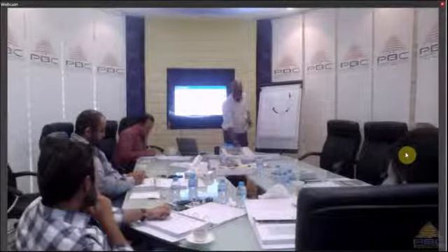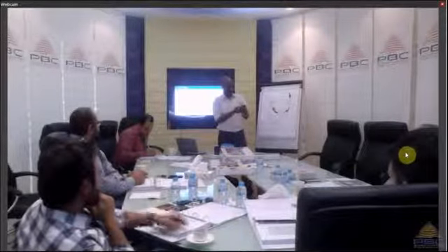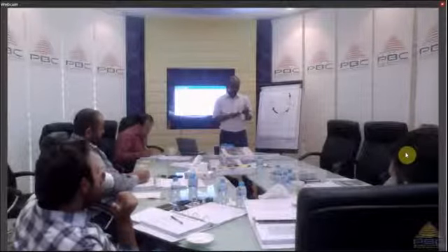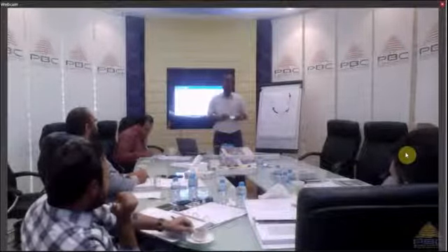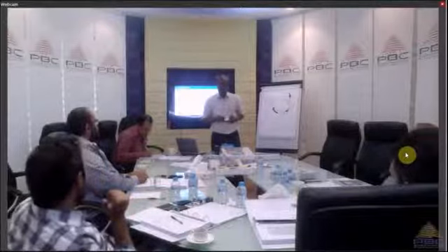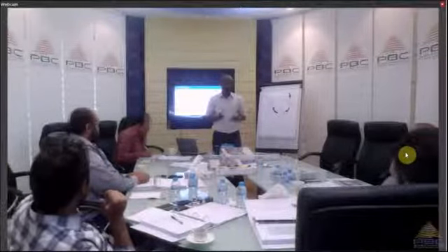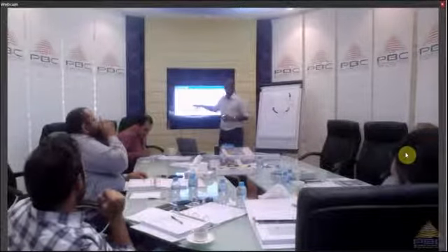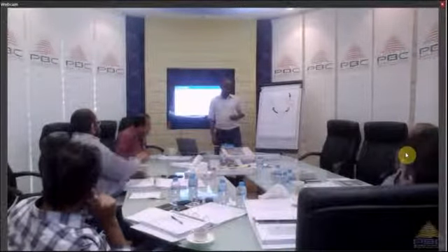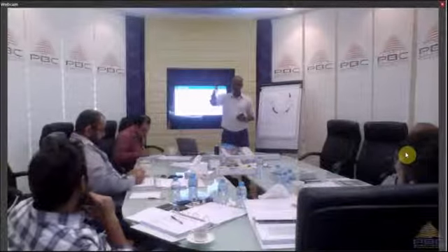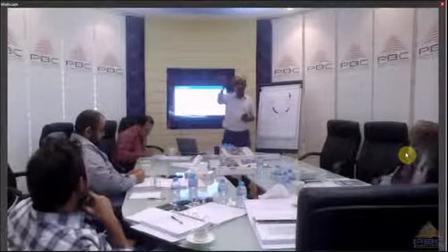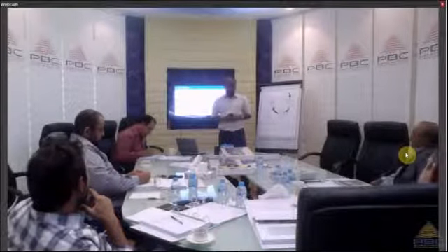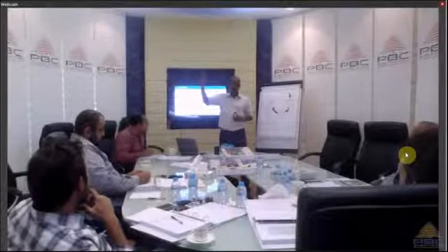Another thing is when you give me the phone and I look at it with the box, everything is fine, and I'll tell you, where is the SIM card, please? And you tell me what? I said, the SIM card. I said, but that's not part of the project. Okay, so this should be mentioned where? Exclusions. We're going to give you a phone in a box that works this way, that you do this testing. However, we're not providing you a SIM card with that phone. We're not providing you this and that.